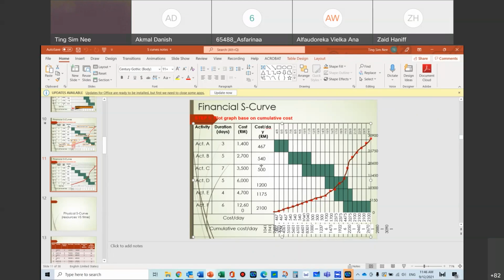So let's say I'm a contractor. Before I go for tender, I already calculate my cost, correct? And when I get the tender, I will also call up the different suppliers and ask for discount, because now I'm very sure that I've got the project. I've called my subcontractor, done out my contract with them. I call up my suppliers, talk to them and get discount and all that. So actually at the end of the day, you have a list of your cost of your work, you see. And this is actually different from the tender sum.